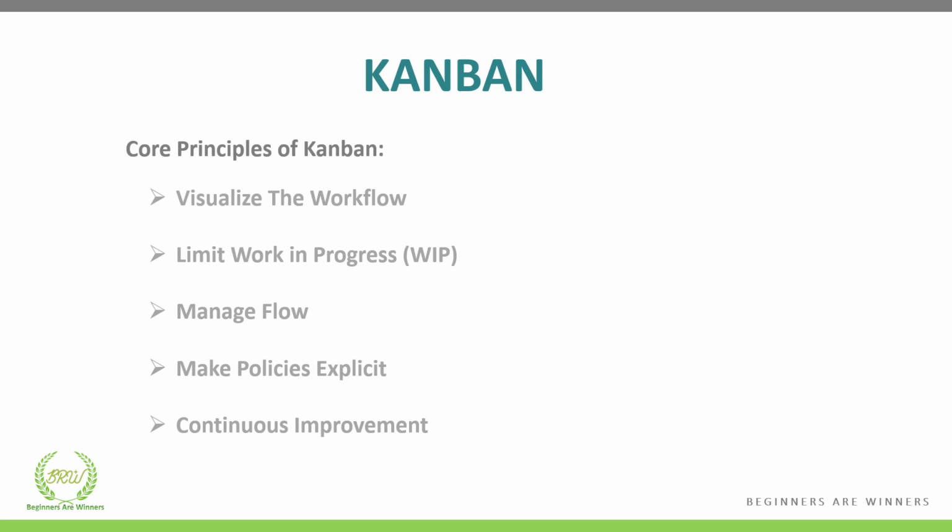Unlike Scrum, Kanban doesn't wait for 2 weeks or 4 weeks for the deliverables. It releases the deliverables as and when any small amount of work is complete and deliverable, to follow a continuous flow of delivery. Also, we don't have any Scrum ceremonies in Kanban, for example, sprint planning, review, and retrospective meetings.